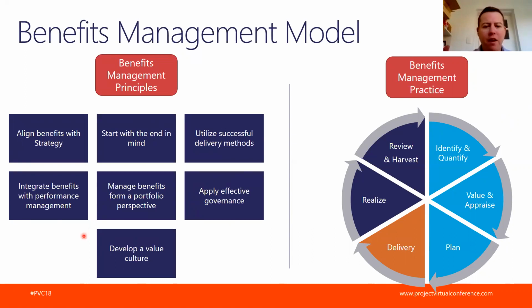When you are tracking benefits, you have several layers in benefits management. You have the project management layer, where you will enter your benefits, validate the benefits and track the benefits. And then you have the portfolio management layer, where you will have an overarching view of all the projects and the overall benefits. That's an interesting part of it, because some of the projects, and you'll see a bit later, are actually enablers. Those projects may have a negative, let's say, benefit because they are not actually producing something, but they are enabling another project to start. So it's kind of a balance eventually at a portfolio level.